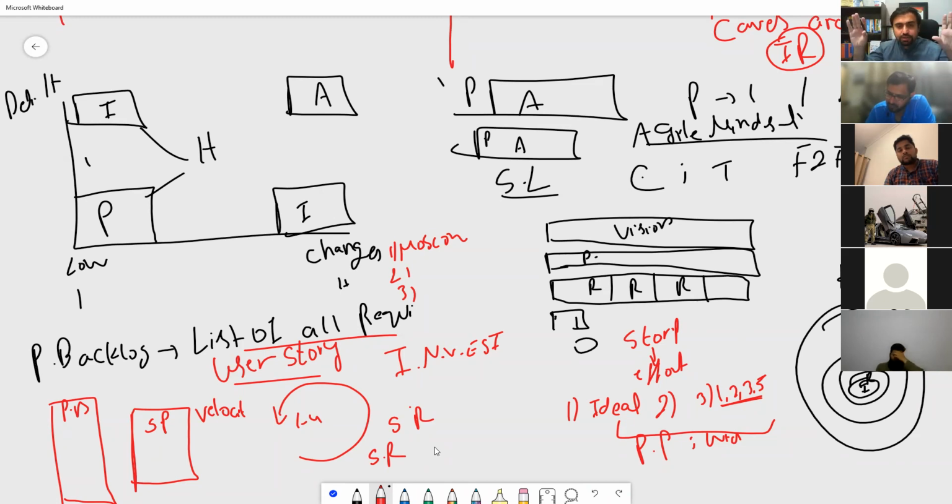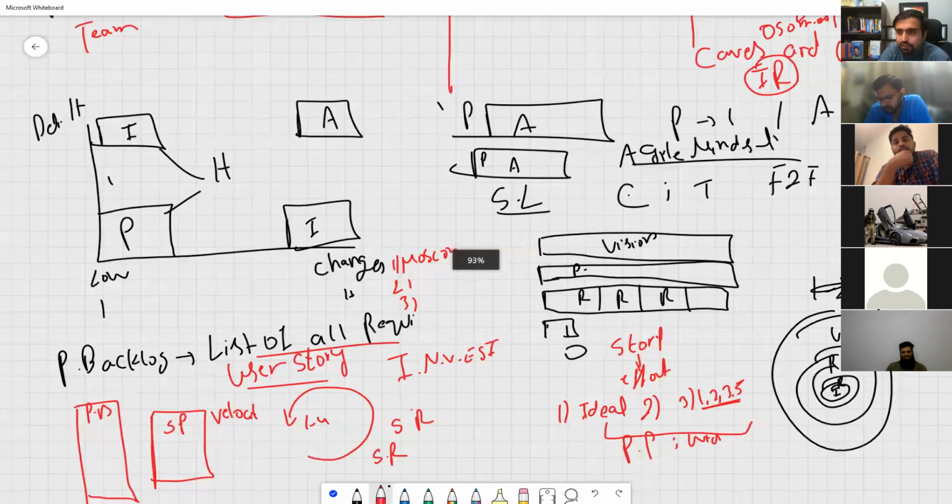Once that is completed, if you get more lessons learned, you put them in the sprint backlog to implement those lessons. The goal of the sprint retrospective is always to get 1 or 2 lessons which they can directly implement in the next sprint so that they can start working. In this way, we work in the agile environment.